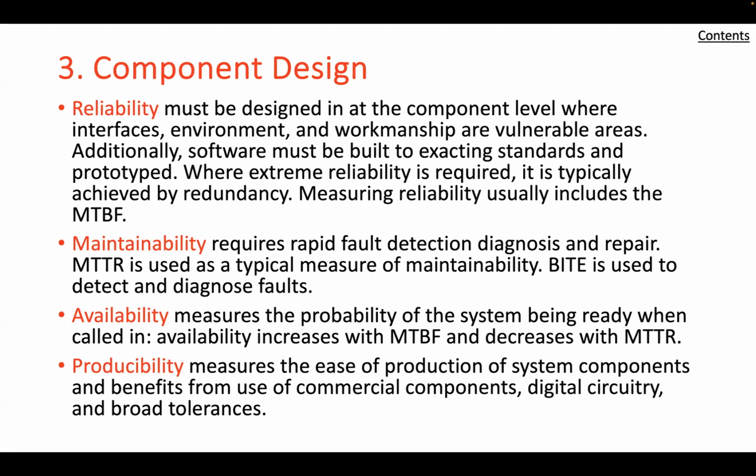In exceptional circumstances where the risk inherent in the chosen approach remains unacceptably high, it may be necessary to initiate a backup effort to engineer a more conservative replacement in case the problems with the first line design cannot be resolved when the design must be frozen. Alternatively, it may be wise to seek relaxation of the stringent requirements that would produce only marginal gains in system effectiveness. All the above measures require system engineering leadership.